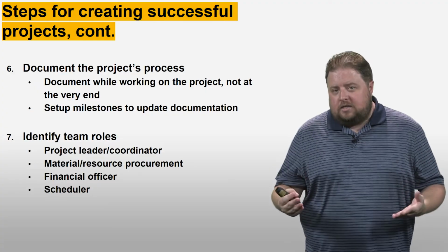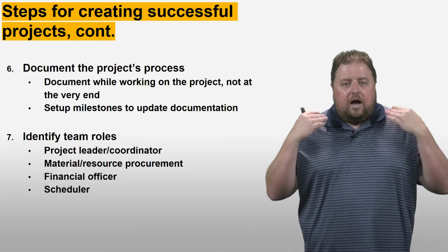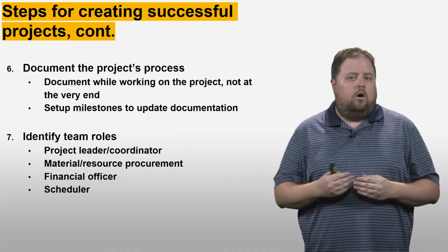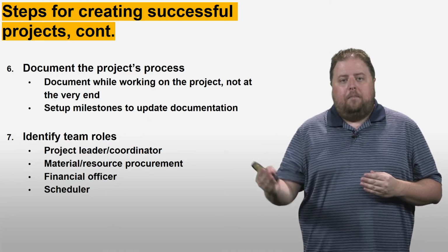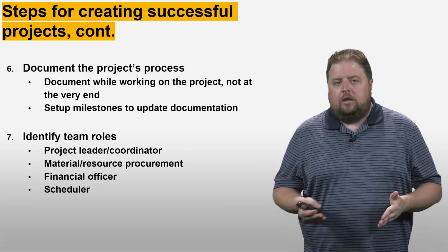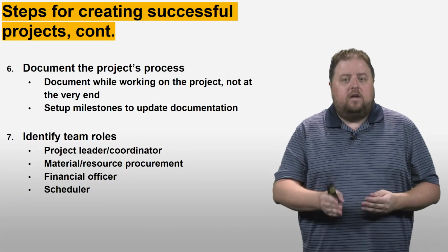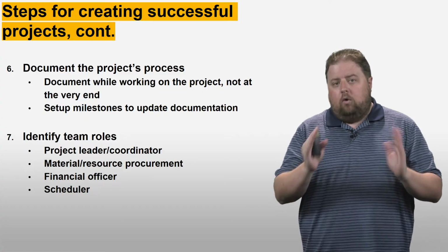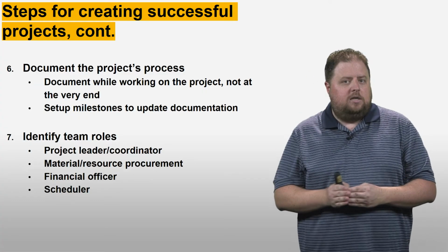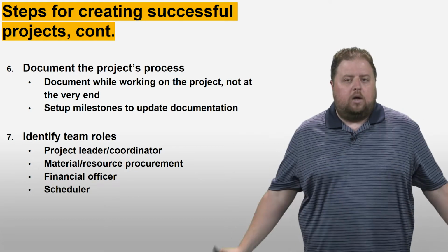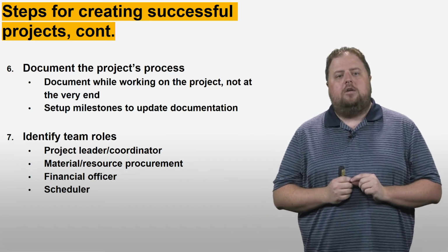Number 6 is we have to document. I cannot emphasize documentation enough. It's important that you're documenting throughout the project process so that you don't do double work. We don't want to have extra work put on our plate because we forgot that we did something in the past. So in most cases, I like to set up milestones to pause and update my documentation. I've worked at places where I literally stop the entire team and we spend 2 hours updating documentation. They're not allowed to work on anything except for updating documentation.